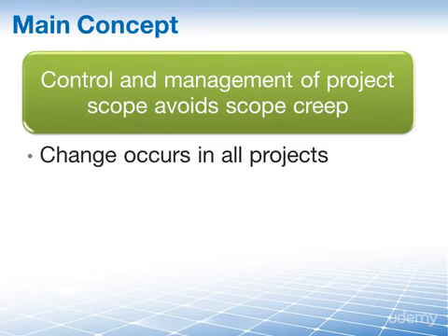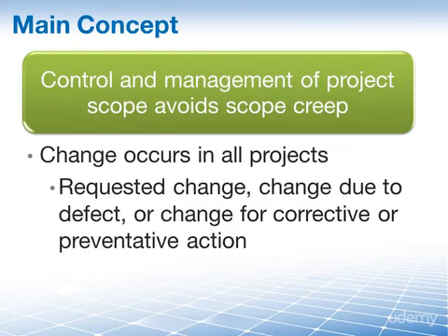It's just unavoidable. Typically, these changes take one of 3 forms: requested changes from the project team, sponsor, or customer, changes required to correct something such as a defect, and changes to prevent the occurrence of an unwanted or undesirable effect in the future.